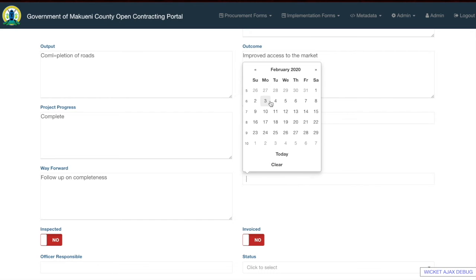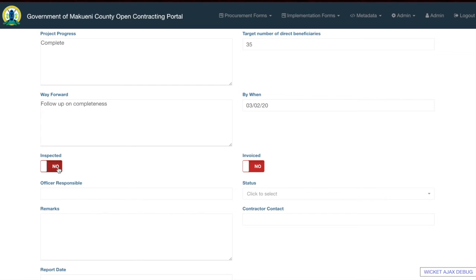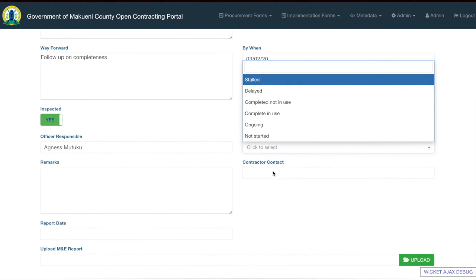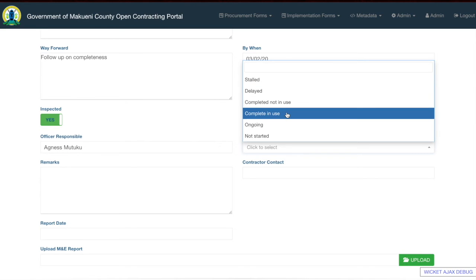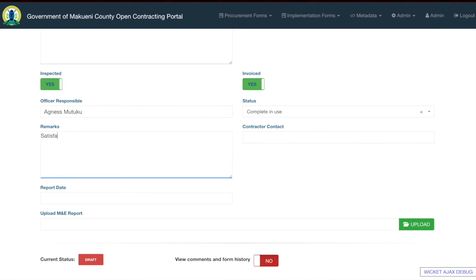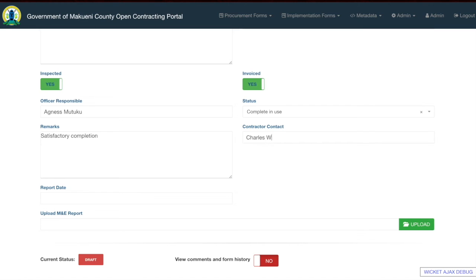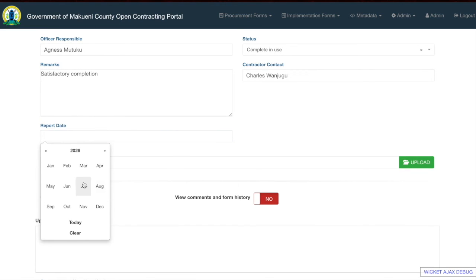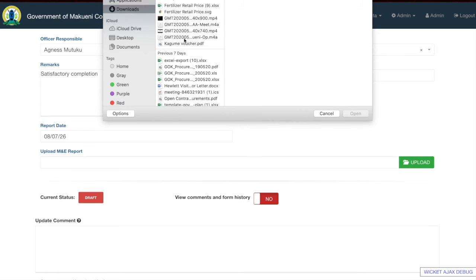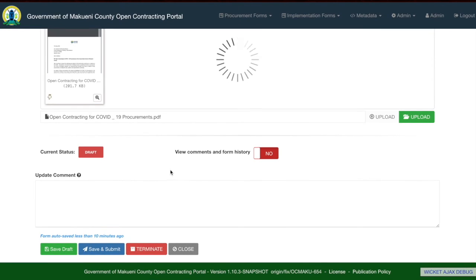You also add the date this is supposed to be done, toggles for whether the project is inspected or invoiced, and the officer responsible. The status options are: stalled, delayed, completed, not in use, complete in use, ongoing, or not started. You then add your remarks, the name of the supplier or contractor, the report date, upload the document, and save and submit.